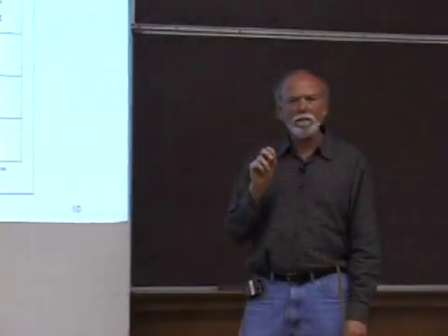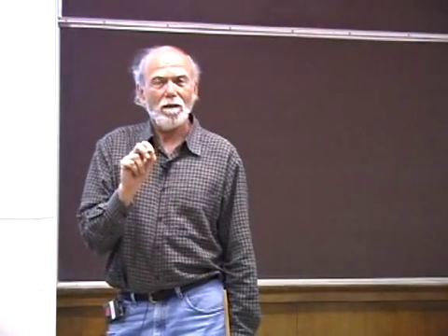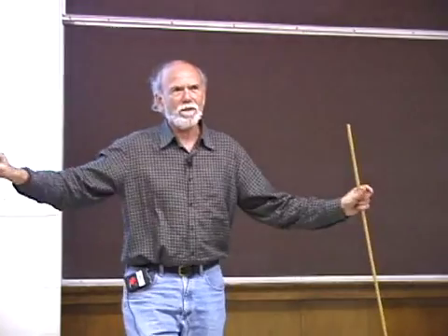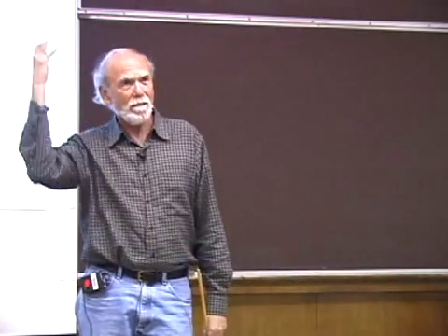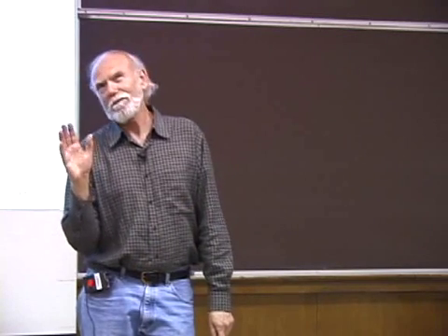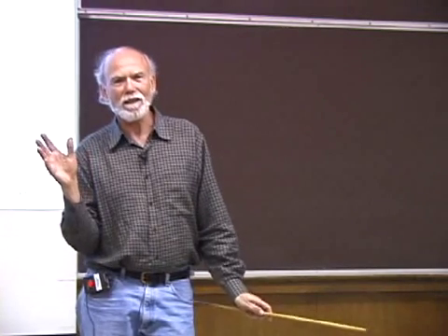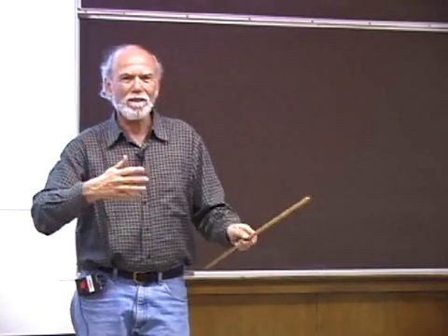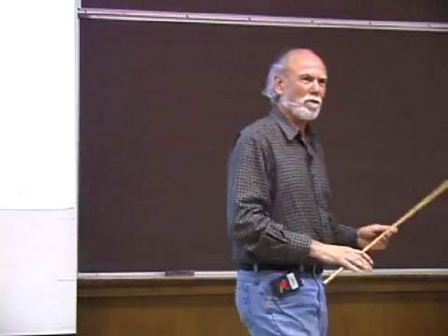What is contingency? The idea of contingency is that things don't cost what you estimate, even if you're as honest as you can be; instead they're going to cost somewhat more, but the amount more depends on what it is. So we go to this very lowest level and take every item, whether it's something you can go out and buy or something that's in Kip's head, and we assign a contingency. The contingency that we used, I don't remember exactly, was something like 4% on anything you can find in a catalog, because maybe by the time you buy it, it's gone up a little bit. So anything you buy in a catalog is 4%.